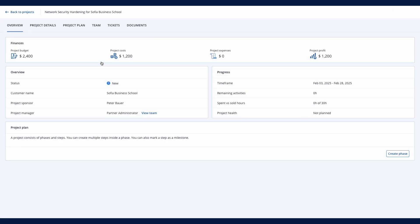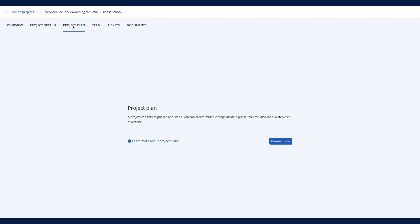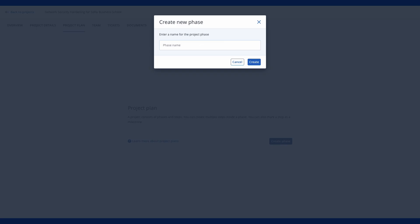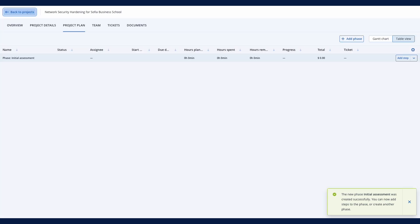Now, it's time to plan the project. Let's set it up and assign responsible engineers. Open the project and navigate to the project plan section. Start planning with the first phase. Click create phase, define the phase name, and click create.